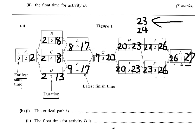We now look at the critical activities. Critical activities are the ones that have no leeway. So let's look at A. A starts on day 0, takes 2 days, and the deadline's on day 2. 0 plus 2 is 2, so that's a critical activity.